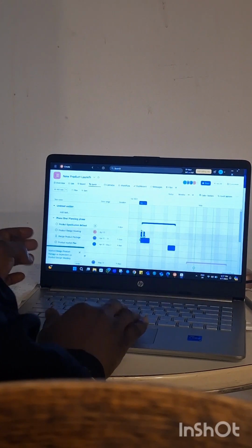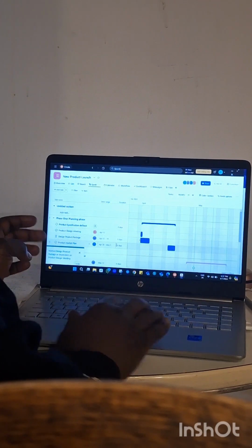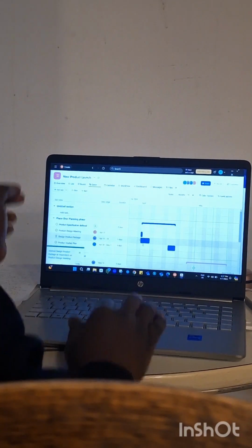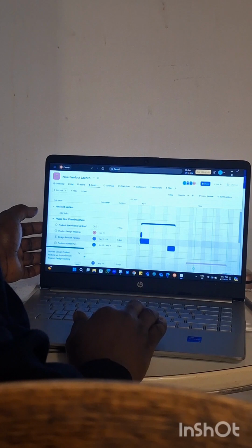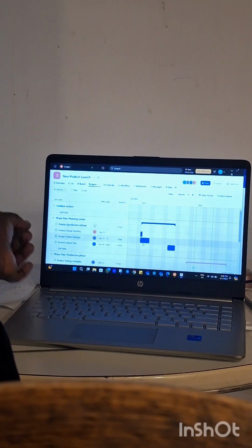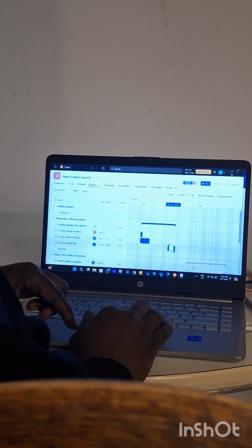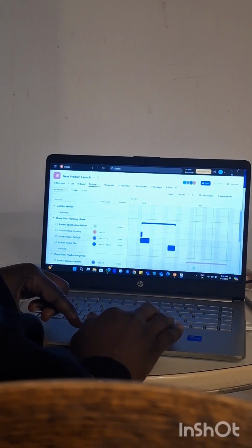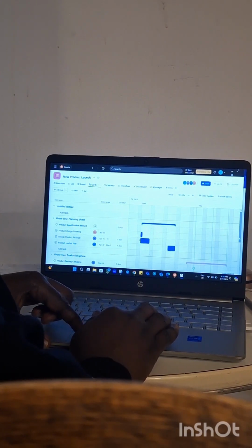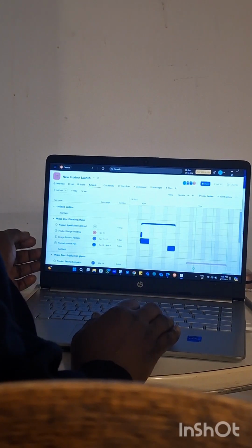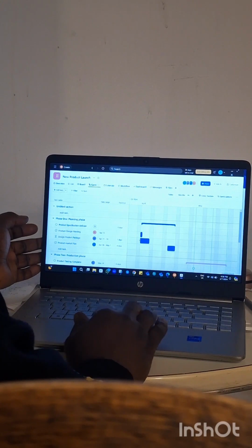It's dependent because it's the outcome of the design meeting that will bring about design of the product package. So with this arrow now, I've created a dependency from one task to another. Between the product design meeting and the design product package, I've been able to create a dependency between these 2 tasks. So this can be done for other tasks too. If you want to create a dependency between tasks, you know what is the predecessor or the successor. So that's for the Gantt chart view.